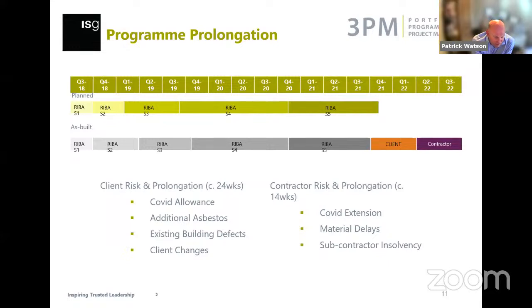And then lastly, and probably quite importantly in our industry, unfortunately, we had 2 subcontractor insolvencies. Just to make it worse, that was within the M&E teams towards the end of the project. And I must state the insolvencies were not due to anything in terms of payment delays on this project. But as you can imagine, losing your main M&E contractor 8 weeks prior to completion causes a lot of issues for all teams.